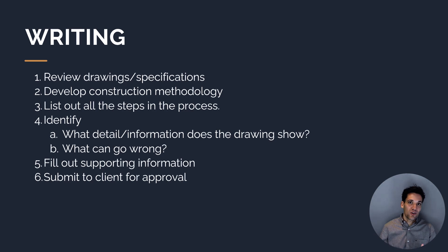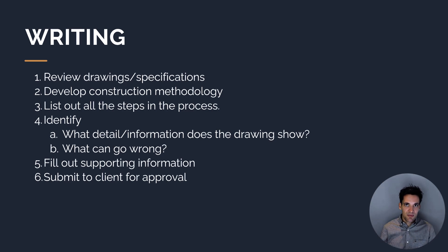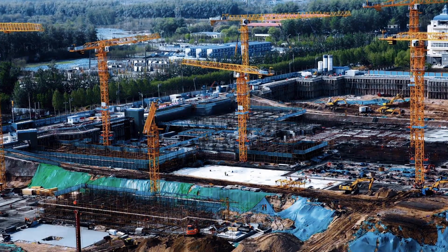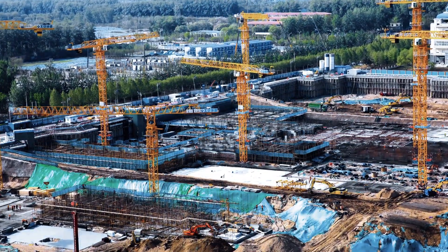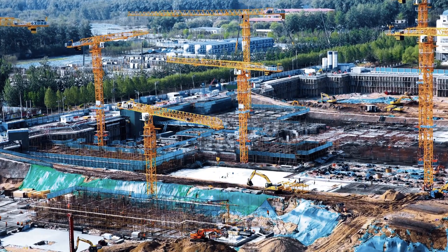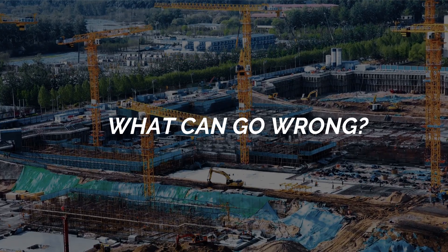Identify which detail and information the drawings show for each of these steps, and understand what can go wrong. If you understand what can go wrong, you understand what needs to be checked to ensure it's done correctly. Then fill out all the relevant supporting information — the relevant drawings and specifications, the frequency — and then submit it to the client for approval and get them to provide feedback and comments. When preparing an inspection and test plan, what you really want to document are the checks around the things that can go wrong — that's the ultimate goal.